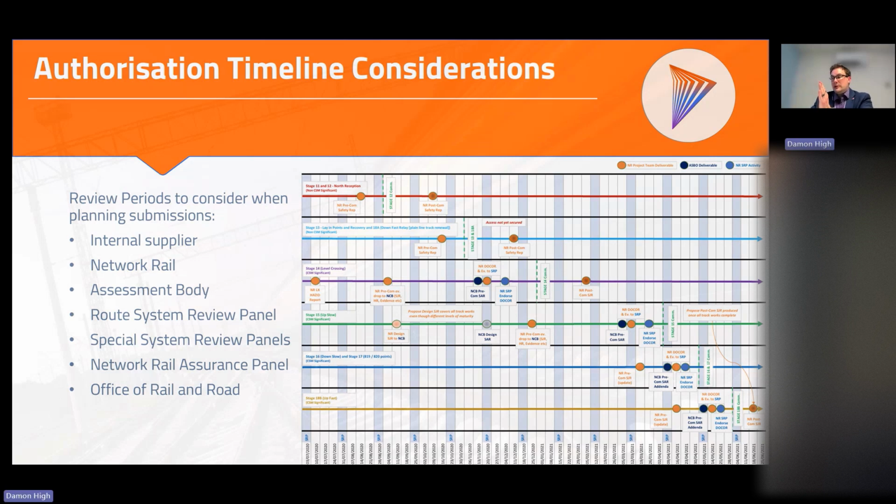If it then goes to another party after that, it could be an MSCC or a national safety authority. They might need another 2 or 4 weeks, 8 weeks for a national safety authority in the UK. We're already taking, what's that? I don't know, minimum like 14 weeks of review periods before we get to our commissioning date.